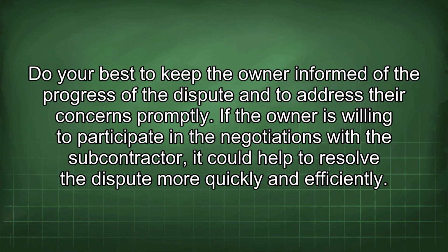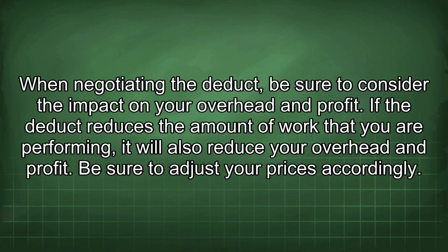If the owner is willing to participate in the negotiations with the subcontractor, it could help to resolve the dispute more quickly and efficiently. When negotiating the deduct, be sure to consider the impact on your overhead and profit. If the deduct reduces the amount of work that you are performing, it will also reduce your overhead and profit. Be sure to adjust your prices accordingly.